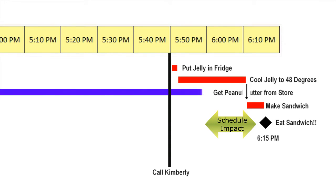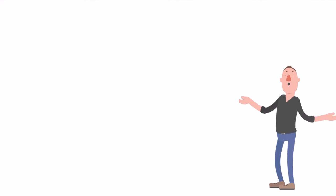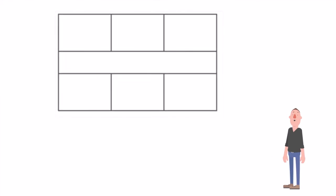So conceptually, you can see the relationships between the activities in this project, and intuitively you are probably already figuring out how rearranging one of these activities or delaying another would impact the project. But with the critical path method of scheduling, we can now see how the relationships look on paper. Let me introduce you to the PERT diagram box. This box represents one activity and is meant to help us calculate how long our project will take and how long we can delay certain activities without impacting the overall project completion.